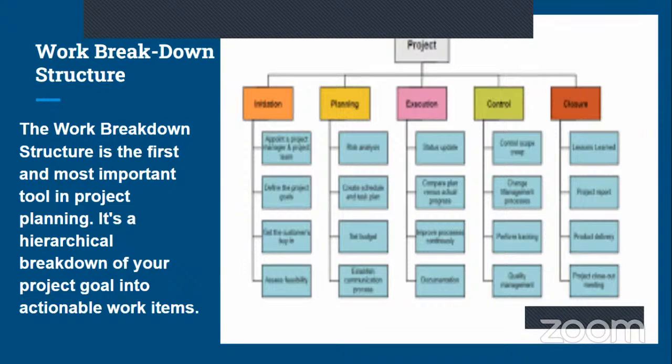So when you are breaking down the project into tasks and those tasks into deliverables, you need a type of flow chart that you can use to monitor what you have broken down. For example, say this is my software program. I've broken it down into building the software, testing to check if it is going to run, and putting it out on the Play Store to be used. Those are the tasks you are doing.